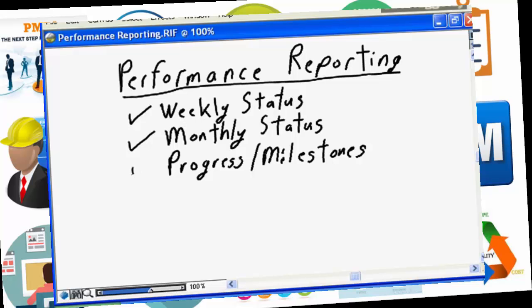And you should be preparing and providing summary milestone reports, probably on a quarterly basis, to the project steering committee and other appropriate stakeholders in your project.